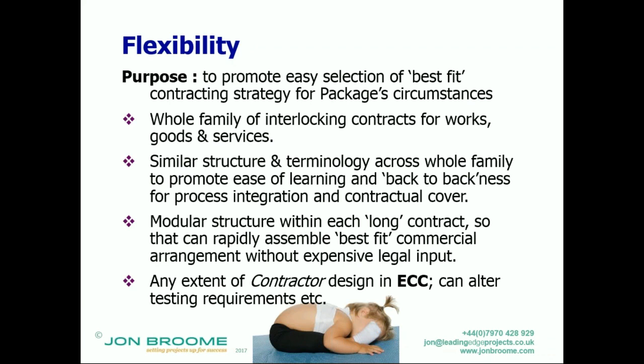So I get less work. It's good news for other organizations who use it, because you can use the same processes across your whole portfolio of projects. And for contractors in particular, it provides back-to-back contractual cover, so they can pass risk and obligations and remedies down the contractual line, which should mean it's a better managed project.